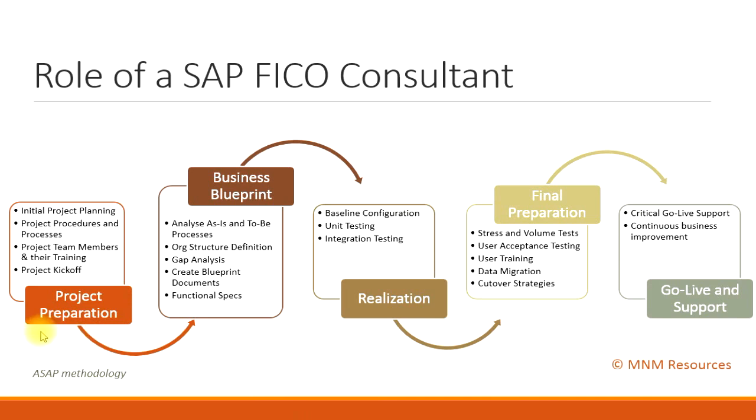Let's look at the first phase, project preparation. Just like its description, it is to prepare this project. It's where you do your project planning, define the procedures and processes, decide how many members are needed in each team, when you need to start off the training, and which day you're planning to go live, to have an official kickoff session, do all the basic communication between your staff members, and so on. So this is mostly dealing with the project preparation.